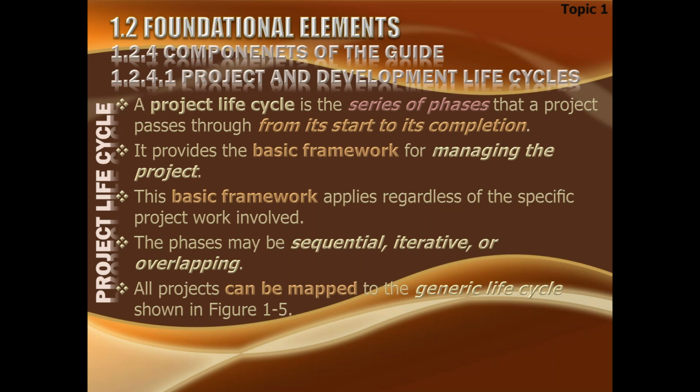If you are really interested in doing two separate paths of work simultaneously, why don't you call it sub-projects? Make your project into sub-projects and keep doing two different activities, two different paths of work in different phases. Like, there is